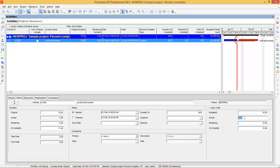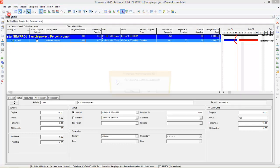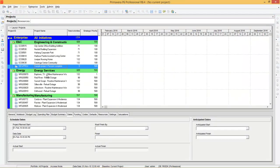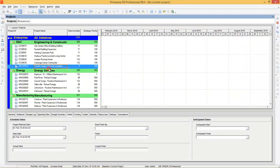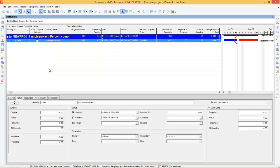Here you can see the actual labor units are not calculated automatically. This is a bug in Primavera. To get rid of this bug, you have to close the project — go to File, Close All, and open the project again. Now enter the duration percentage as 40%. Now you can see the program has calculated the actuals automatically. So hopefully you understand how to get rid of this bug.